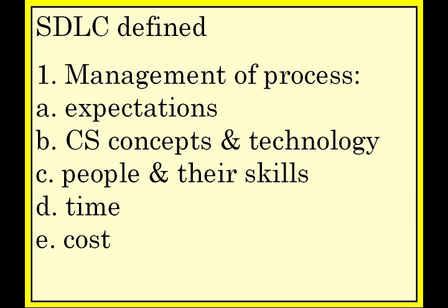In the production world of IT, the system development life cycle is used to manage cost also. In actual system development life cycles, you would estimate the total development time, the total developer cost. How many people need to be involved in this project for how long? The system development life cycle absolutely manages other resources too. To do this job in this amount of time with this amount of cost, what kind of equipment am I going to need? What other resources are necessary to carry out my process?